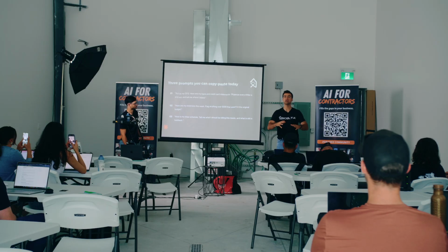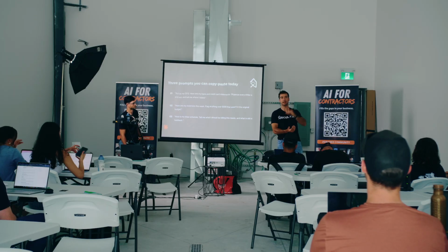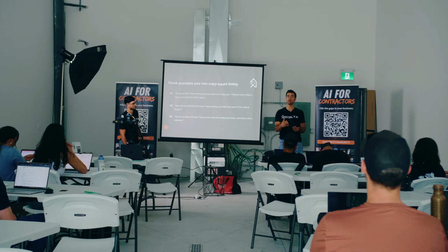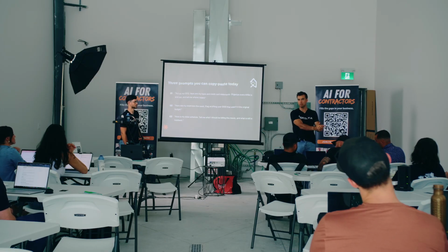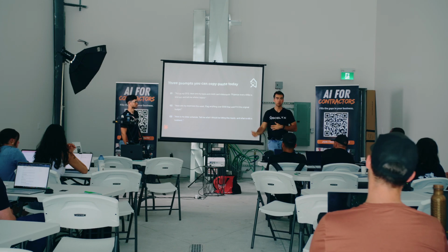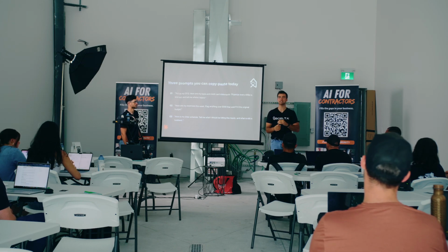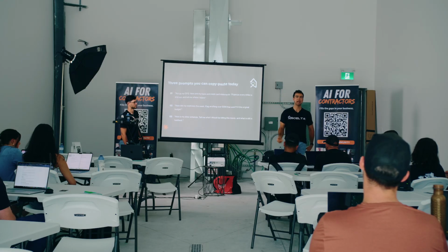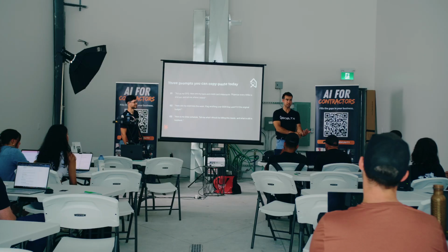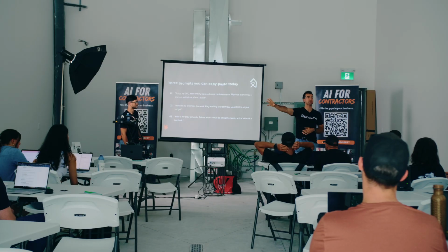So for those of you who work on bigger jobs with many line items, every time you go to make a bill, let's say you have a $1 million PO. Now you're going to bill against that, which is called progress billing. So every time you complete a scope of work, let's say after month 1, I've completed X percentage of the job. So here's my progress billing tracker. You have all your line items, and I know I've gone through this activity with someone in this room, and you go through and make sure that every line item matches up to the work that's actually been completed. That way you can bill against the total PO, and then provide that photo proof, provide the receipts, provide the timestamps, and submit that for your billing.